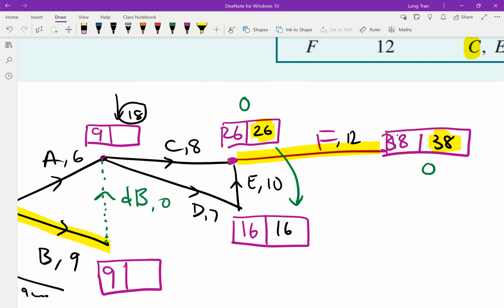Then what about here then? Well, 16 from here to get back to that same point, the start of C. Well, 16 minus 7 gives me 9. So out of the two, the latest start time has to be 9. Has to be 9 for C.